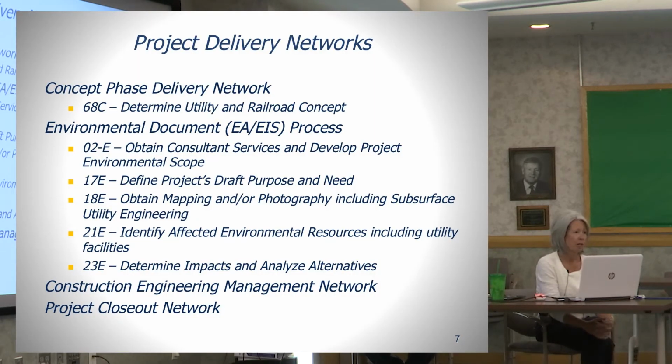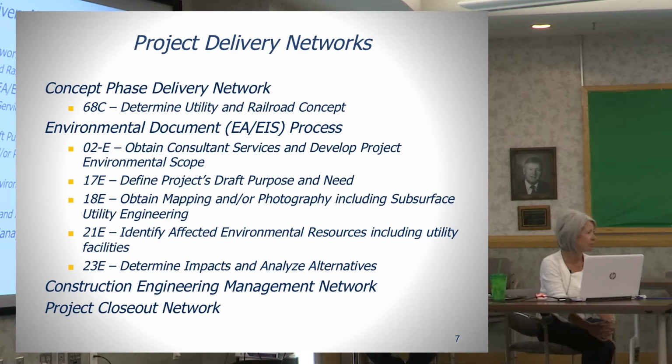We're going to talk a little bit more about the design phase project delivery network when we get further into the presentation, but the PDN isn't the only UDOT delivery network that includes utility tasks. As I said, the concept phase, the environmental phase, and then after construction begins, the construction engineering management network, as well as the project closeout network, all contain tasks related to utility planning, design coordination, and all the way up to final project billing closeout.